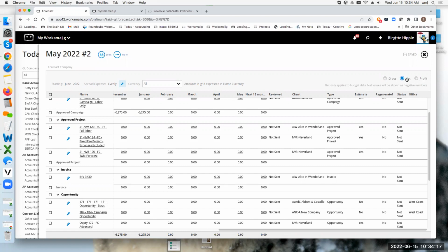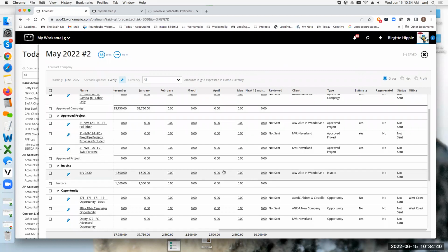But most of the time, it's usually looking at the net of those expenses that you budgeted for. I have $1,000 in printing, net amount to the vendor. I have a 20% markup. Gross is going to show up as 1,200. Net is going to show up as 1,000. My profit's going to show up as 200. Okay. And again, we'll go into the monthly calculations in much more detail.